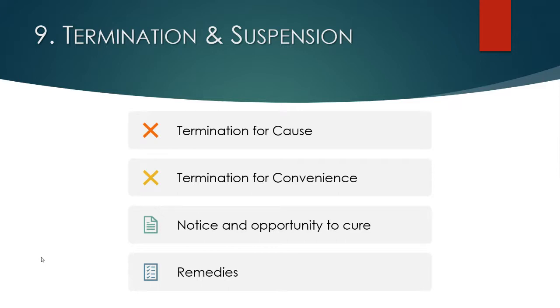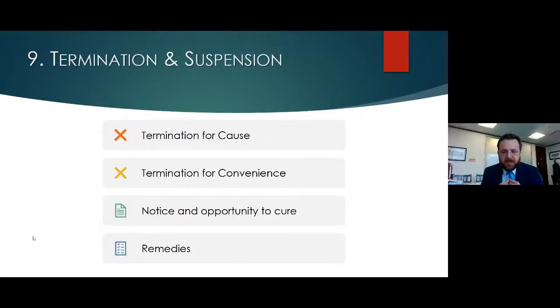Important to know that if you think it's a material breach, so you terminate, but the court determines that it's not, what does that mean to you? That means that the general contractor is going to have a claim, a cause of action against you for improper termination, and whatever damages they suffered from your termination, you're going to be liable for.